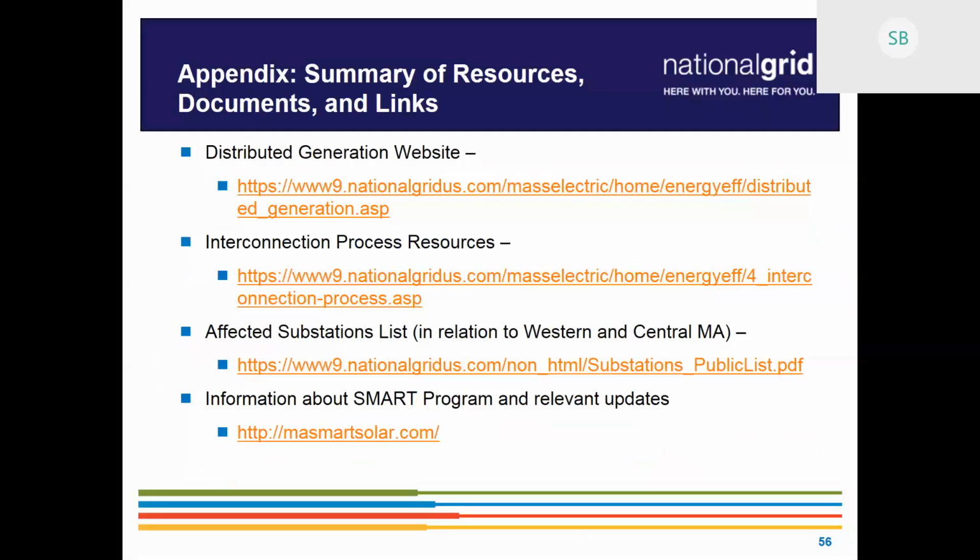So a lot of information offered up today. Thank you for some great questions, really. A lot of super questions today, some good conversation. What I heard today is that we've got a congested area in central and western Massachusetts. ISO New England is more interested in our projects over 1 to 5 megawatts, certainly over 5 megawatts. If you're thinking of applying in that congested area, you're going to know there's going to be additional time to process that application.